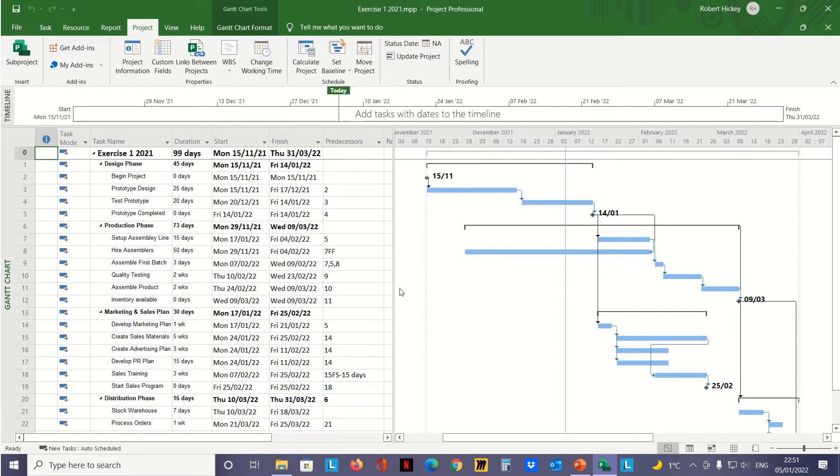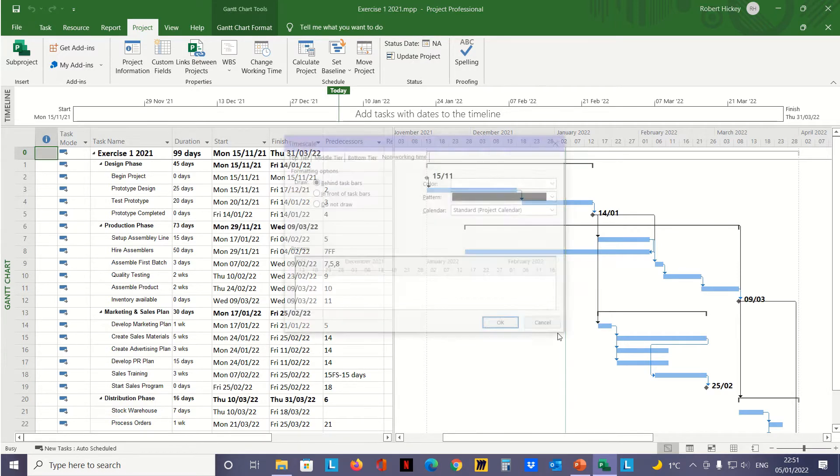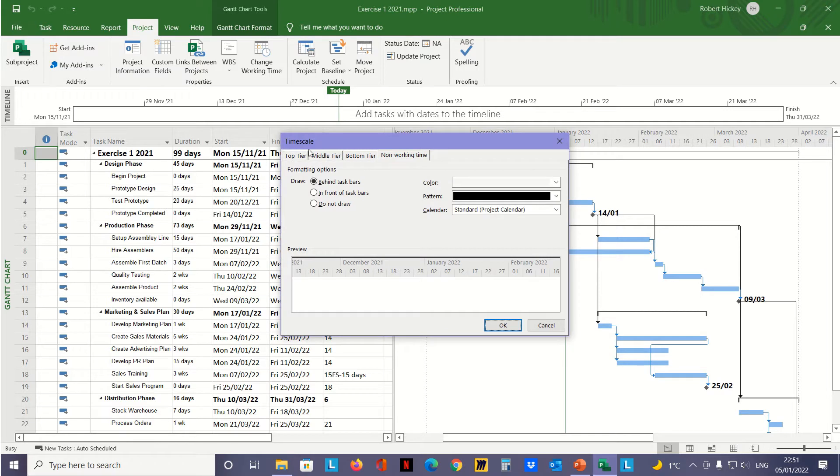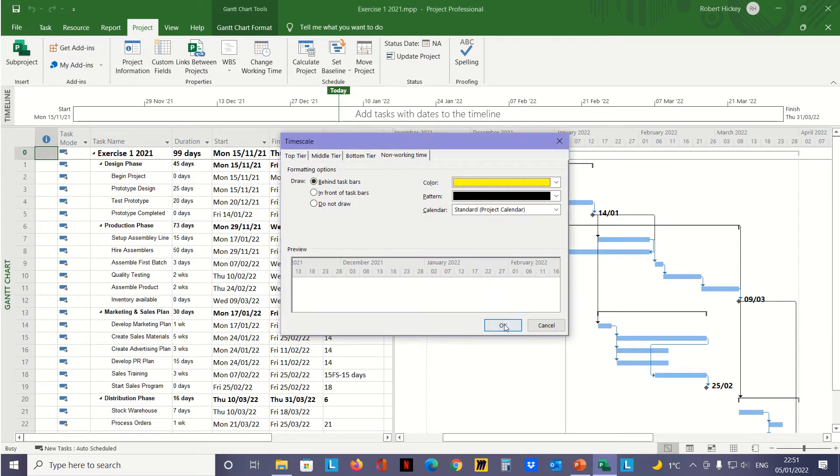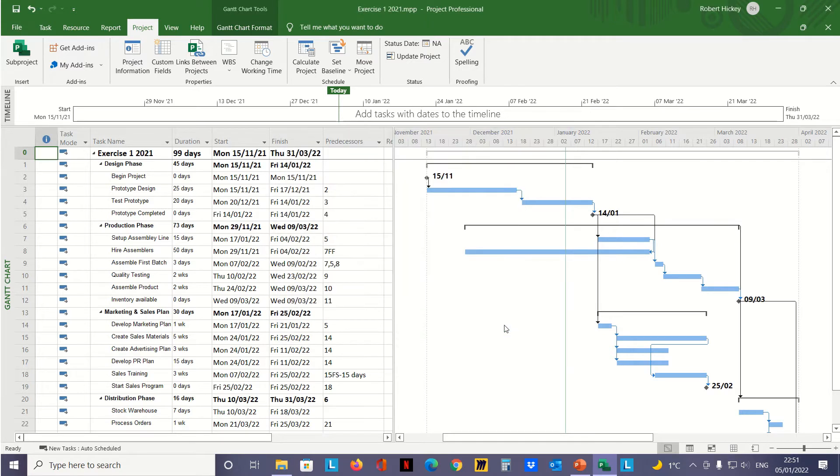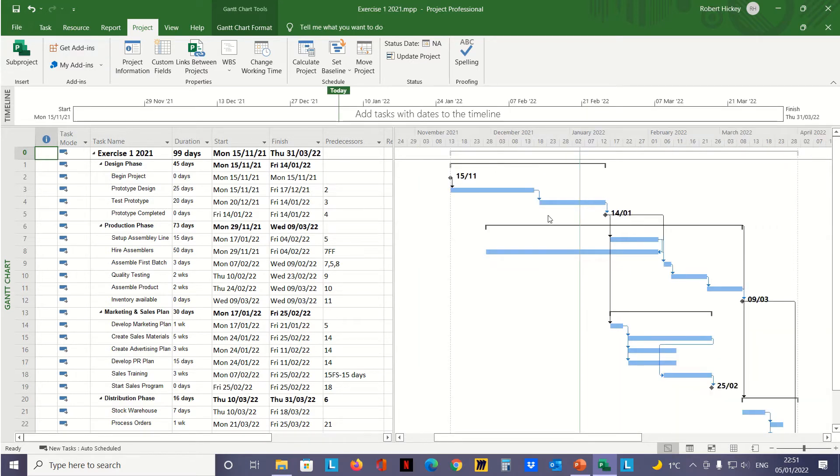Before I do that, I'm going to right-click on any white space in the Gantt chart. From the context-sensitive menu, I see an option for non-working time. Selecting that opens a dialog box for timescale, where I can change the color for non-working time. I'll click the dropdown, select yellow, and click OK. You can't see any visible change yet, but if we zoom in on the Gantt chart, we can see all the non-working time is highlighted in yellow—that's the weekends. I'll zoom back out.